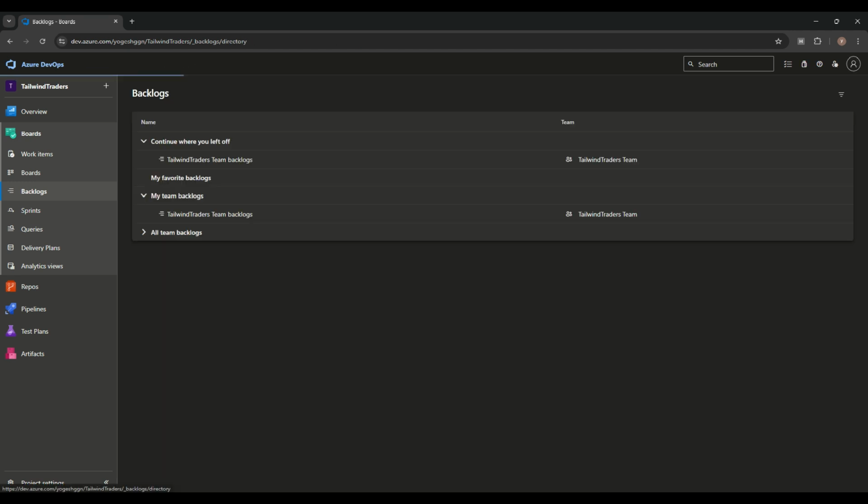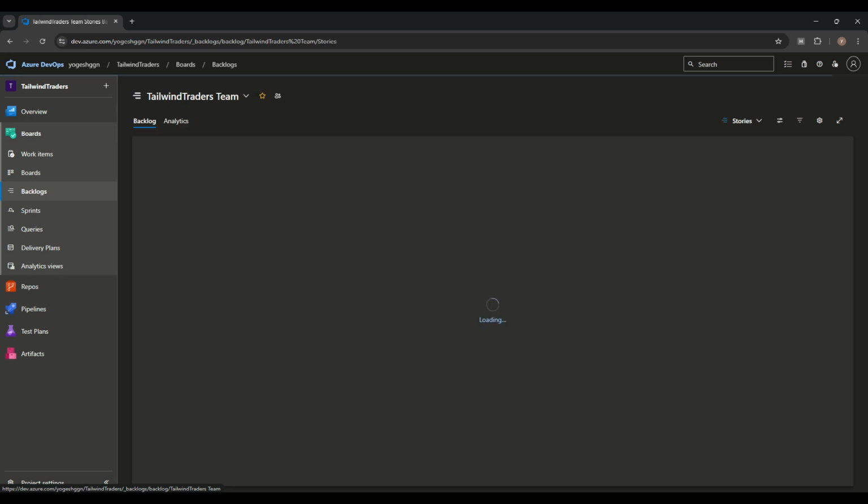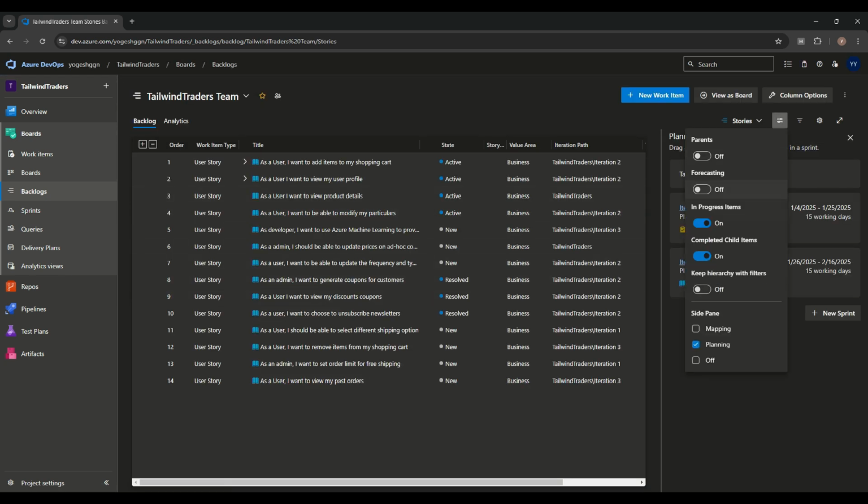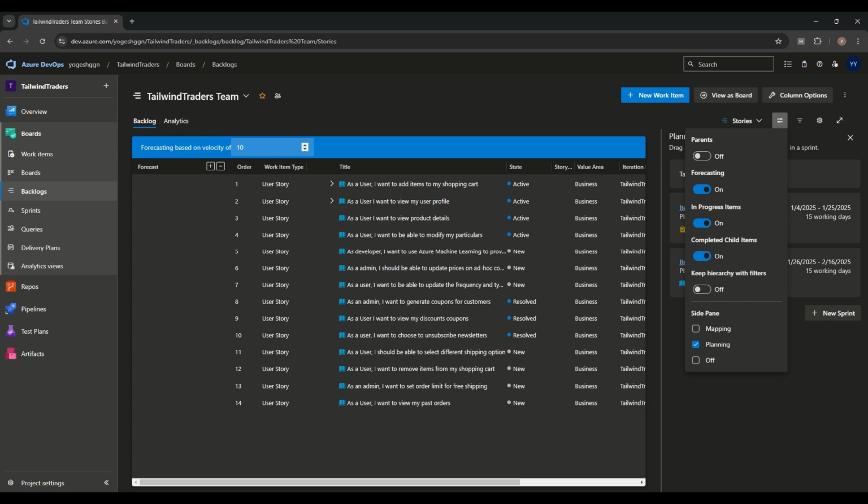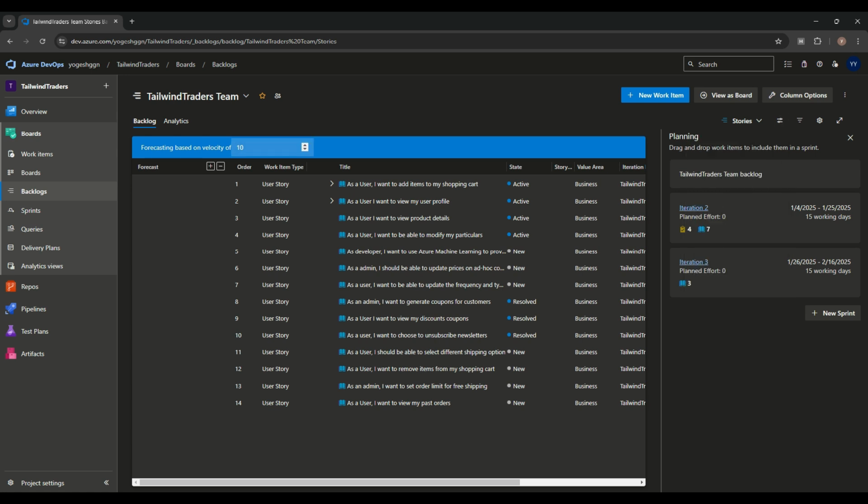And guys, one more thing, when we go into the backlog, suppose this is the team, here we can see forecast also. According to the forecast, this is the velocity, meaning how we completed all the work items in the last iteration. According to that, it forecasts what the velocity would be. According to that, we can make a plan, we can add more developers, or we can create tickets if somebody doesn't have a ticket, so that we can get more tickets completed. If we have more workload, we can add developers in the current sprint also. So this is the way we can forecast for future purposes.